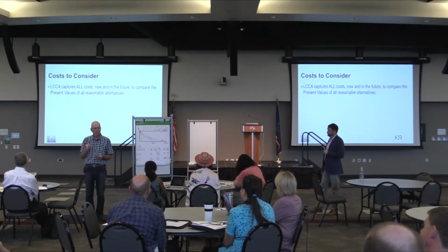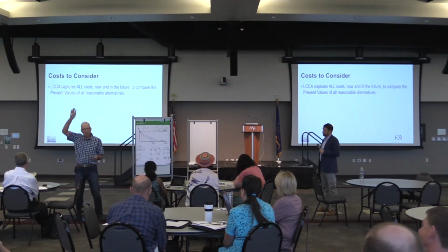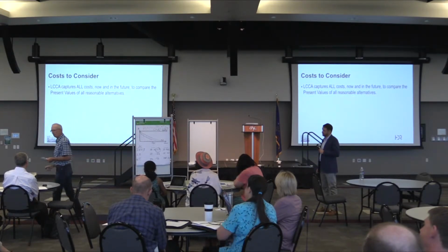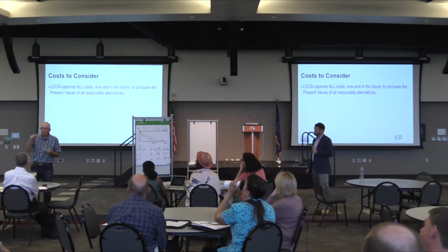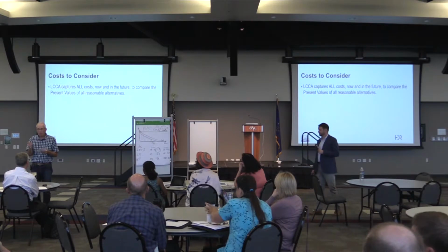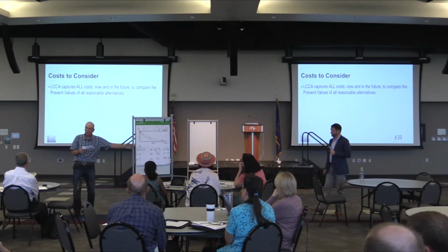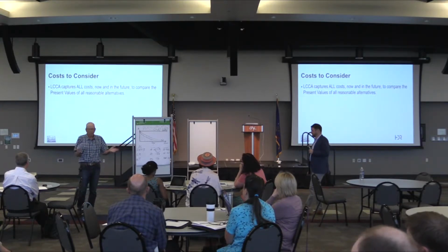That's not an argument. I heard that the other day, some old guy on the Buffalo Red watershed: why didn't we build this in 1950 when it was only $1 million? Well, I got on my consumer price index, and $1 million in 1950, you know how much that is today? $10 million. Same amount. You can buy the same stuff with $10 million today that you could with $1 million in 1950. So the price is exactly the same. So there was no reason to build it in 1950 because it costs the same today.